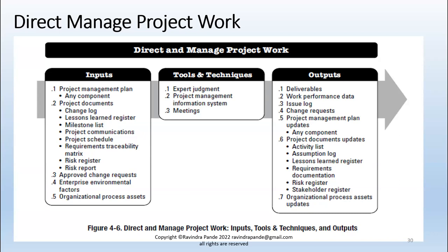Red means the project is delayed and needs immediate assistance from management, PMOs, and the other bodies within the organization. Yellow means the project is going into danger, so it might need help tomorrow, the day after tomorrow, or as early as possible. Green means the project is doing okay. It's on time, so they have enough space for achieving their quality, whatever they have mentioned.